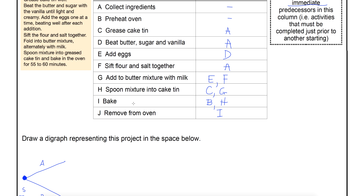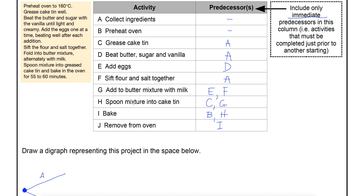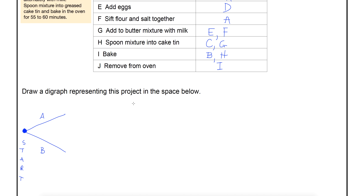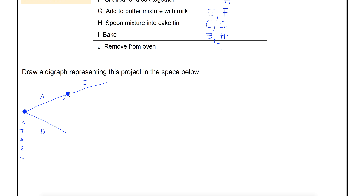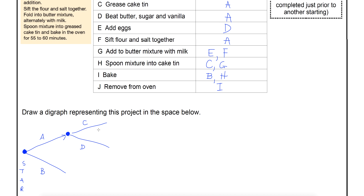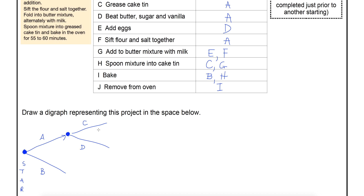I'm going to start working down the list. C needs A to be done. Where A finishes — at this vertex — C is going to come after that, so I need to put in C. D also requires A to be done, so I'll put D in. E requires D, so we finish D and E comes after it. You can tick them off as you go — that's helpful so you can see where you're up to.